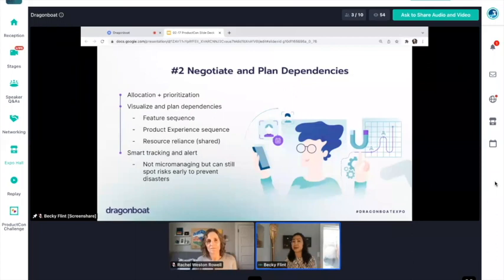And sometimes it's the product experience dependency. So if we want to have a mobile experience, but the web experience is out of sync, then people will have something that looks very different, not coherent. So you also have to think about how this will tie together. So all I'm trying to highlight is that the user interaction and the product experience across multiple teams becomes so intertwined and so ingrained in today's product team of any size. So understanding the goal and the focus and the potential conflict and the plan and negotiating the dependencies is very crucial for your team to be empowered and autonomous.